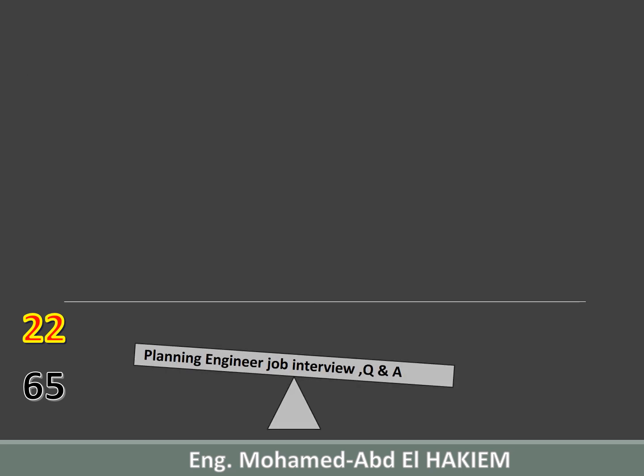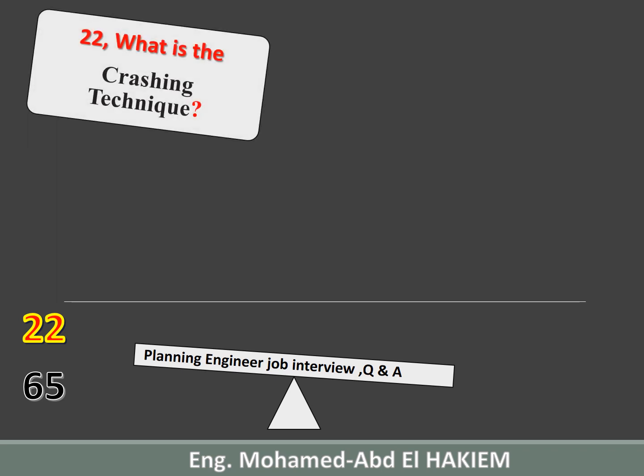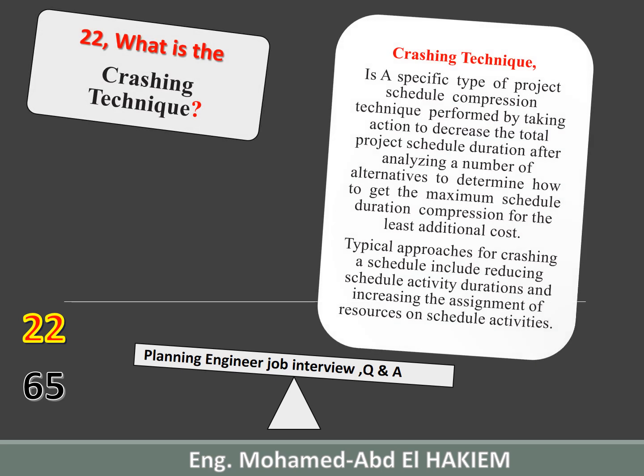22. What is the crashing technique? Crashing technique is a specific type of project schedule compression technique performed by taking action to decrease the total project schedule duration after analyzing a number of alternatives to determine how to get the maximum schedule duration compression for the least additional cost. Typical approaches for crashing a schedule include reducing schedule activity durations and increasing the assignment of resources on schedule activities.